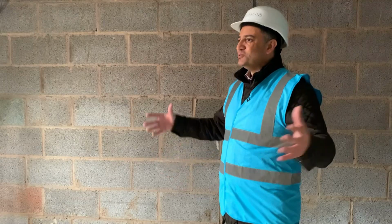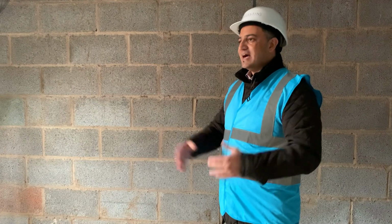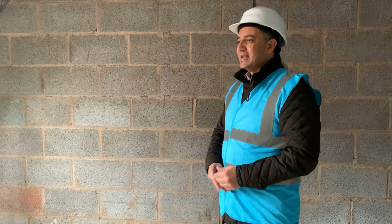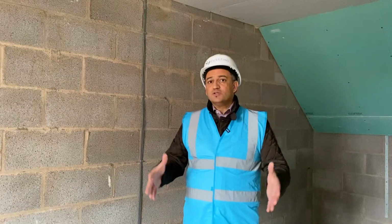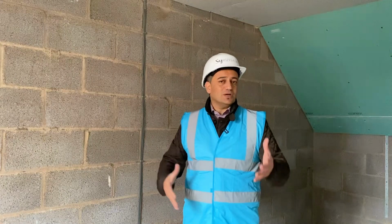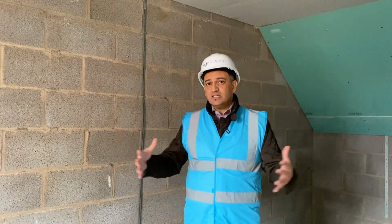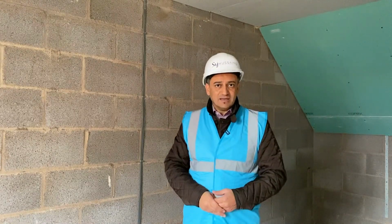Who said property development was easy? It absolutely isn't easy, but I guess here's the thing, the rewards are huge at the end. The light at the end of the tunnel is fantastic, and we're very close to that now on this particular site. So two key challenges that we've had here. Earlier on, it was around the materials, not being able to get materials, particularly when lockdown had happened. Really the supply chain started to dry up, and plasterboards and other materials were really difficult, and that knocked us back a little bit.